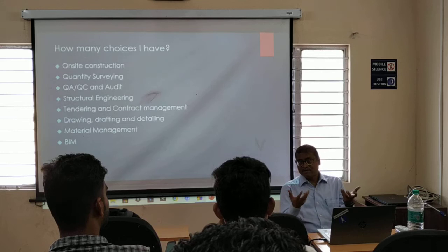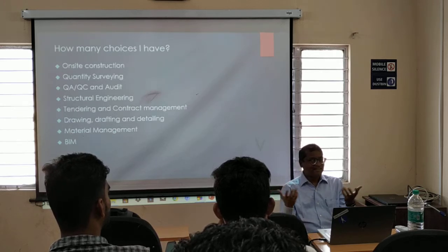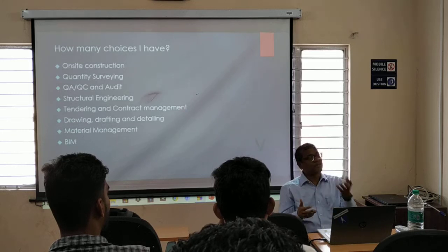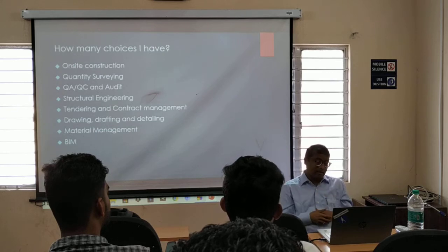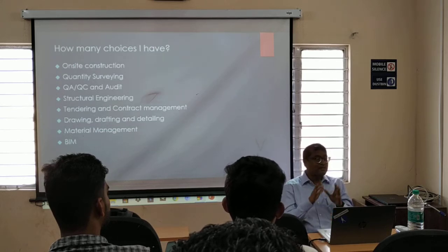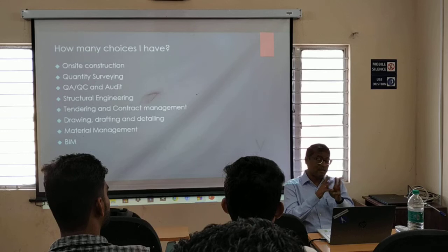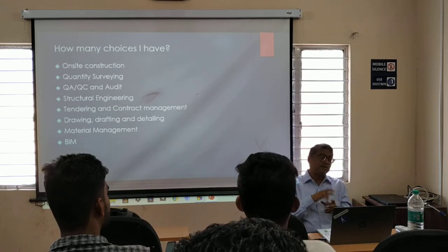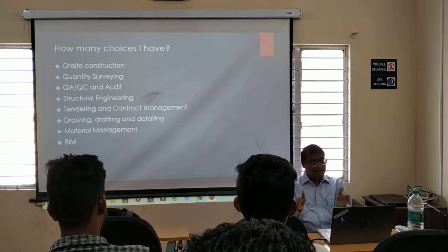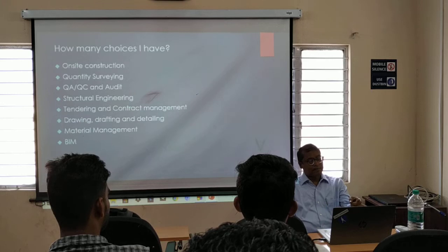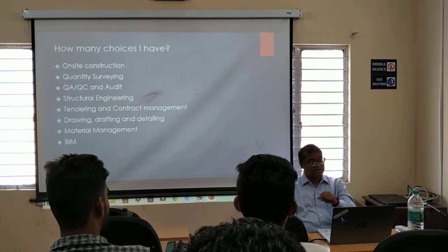Fifth dimension, 5D. What about time? Then what is more important? Cost. So 5D is cost loaded. If you load your cost into the construction, and the 6D model means even the sustainability factor is built into BIM modeling, and that is why the moment the work is done, the BIM coordinator or BIM cost engineer can know how much work is done at site.